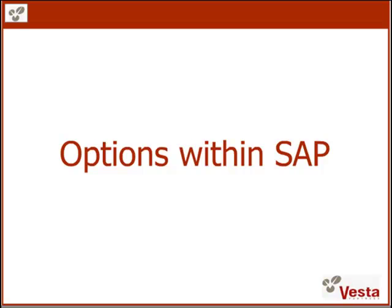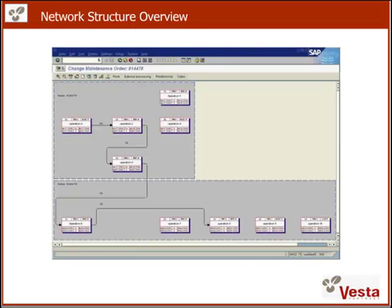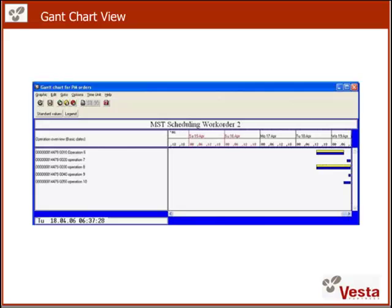Let's look at the different scheduling options within SAP. What you see here is the network structure overview screen. You can find it by following the menu path: go to, graphic, network structure in your work order transaction. It shows the individual operations and their relationship to each other, and also allows you to see the dependencies to other work orders. This screen is not only for visualization purposes, but also allows you to create or modify relationships.